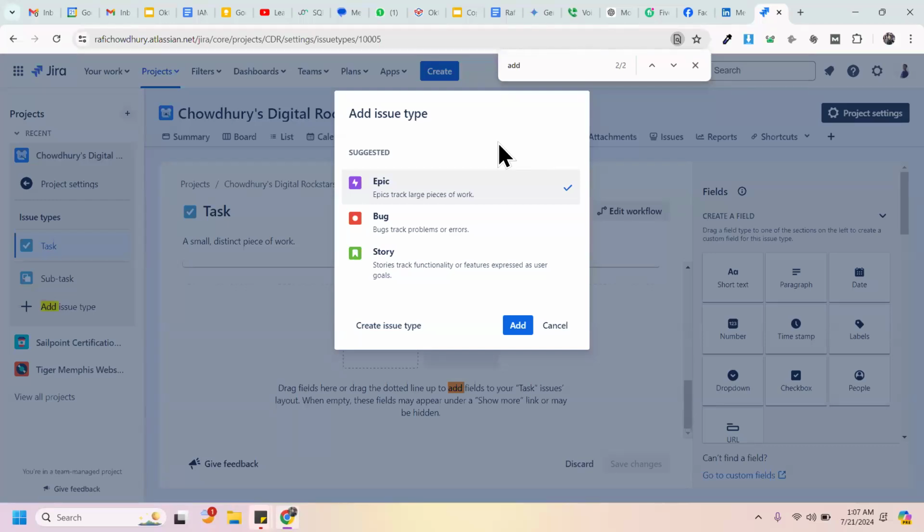So there could be a second subtask where someone takes that wireframe and builds a design based on it, which would again take a couple of hours. So you can go as granular as you want, but mostly there are these three levels: epic at the topmost level, then story and task, and then subtask.